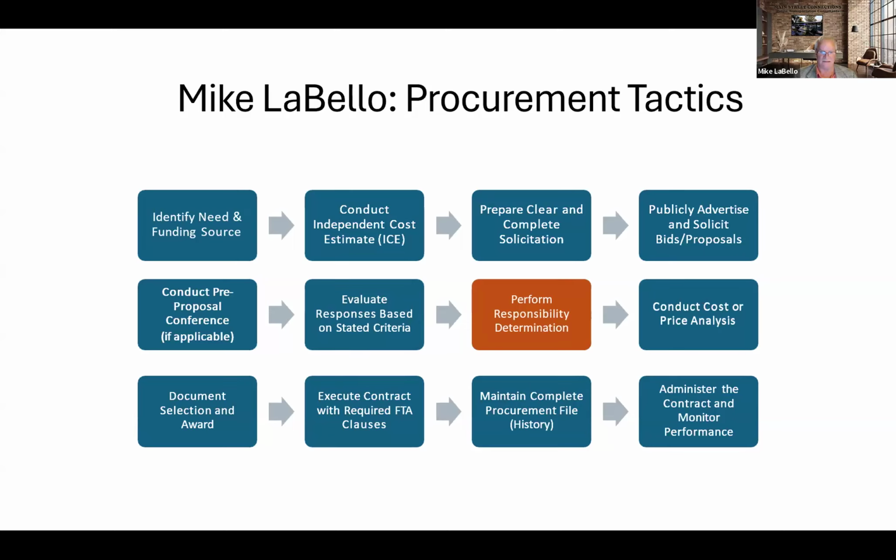The next task is to conduct a cost or a price analysis. This is where you assess whether the price is fair and reasonable, and it further helps you justify the award.